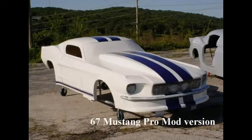6.5-second quarter-mile. Measurable details. Based on competitor analysis, LJRC estimates the car needs at least 4,200 horsepower to achieve Luke's performance goals. This translates to a minimum engine output of 1,050 horsepower per liter, HP/L, for the chosen engine block. Budget impact. LJRC allocates the budget considering both stakeholder needs. They prioritize high-performance parts to meet Luke's goals, for example, allocating $60,000 for a top-tier, lightweight racing engine with a proven track record of exceeding 1,050 horsepower/L.